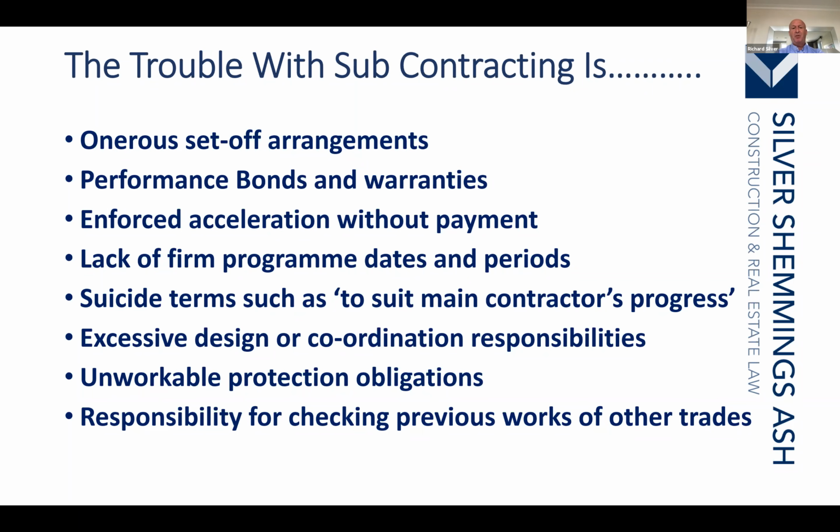Obviously, provisions for performance bond and warranties. Unless the contract provides for a warranty, you don't have to provide it. And unless the wording's agreed, it's an agreement to agree, which is unenforceable because you will never agree.